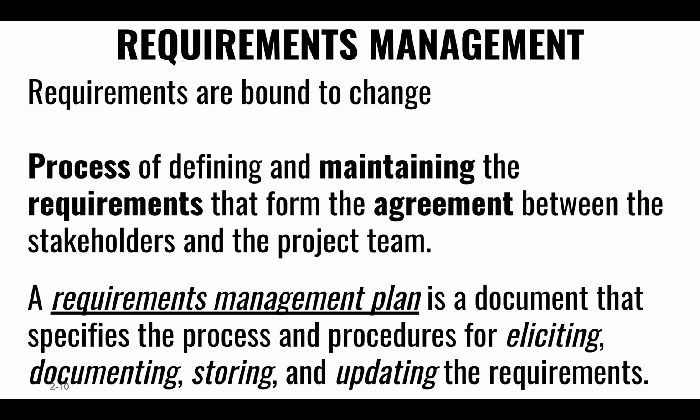Somebody's going to fill out a form, a request for change form, right? That's going to be reviewed by this committee every week, right? On Wednesdays at noon they meet, and they have a brown bag. They eat through this, and they prioritize it. They have more questions for the party who's proposing the change, and they prioritize it, and then they put it in some huge to-do list, right?